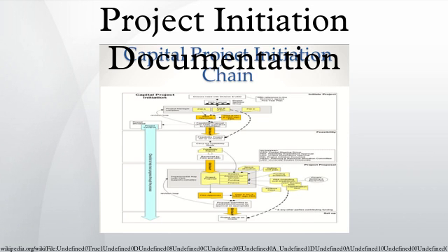The project initiation document provides a reference point throughout the project for both the customer and the project team. A project initiation document often contains the following: project goals, scope, project organization, business case, constraints, stakeholders, risks, project controls, reporting frameworks, PID sign-off, summary.